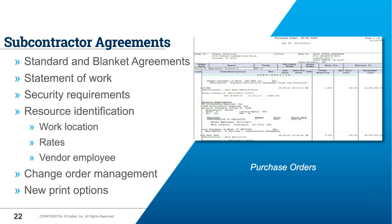Change order management has been upgraded to also track changes to the statement of work, which is very important as subcontractor agreements always have many modifications — the statement of work outlines the rules and specifications of what the agreement covers. There are new print options as well — you can print all this information, including vendor employee names, on your hard copy of the purchase order if desired. This is set up in print options for what subcontract management pieces you want to print.